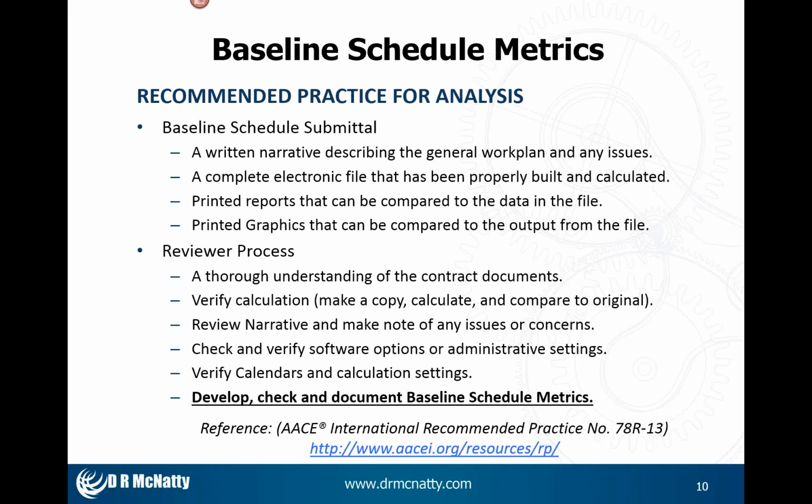Your schedule specs should be specifying that the contractors use project level schedules and calendars, not global calendars, when they're putting their schedules together. That way their calendar can come in and you can be relatively assured that nothing's going to change in it. Then we get down to the real work, which is to develop, check, and document baseline schedule metrics.